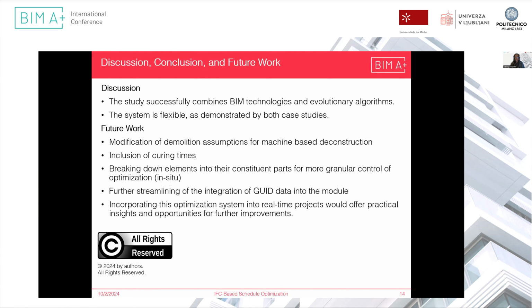The inclusion of curing times for in situ elements, and breaking down the elements into constituent parts, so we are not calculating just for concreting, for example. We are considering the formwork and the reinforcement, a more granular way to control the optimization. And further streamlining of the integration, obviously, of the GeoID data that is possible. And finally, the most important bit would be to put it into practice in a real-time project in order to work out the kinks and refine it even more.